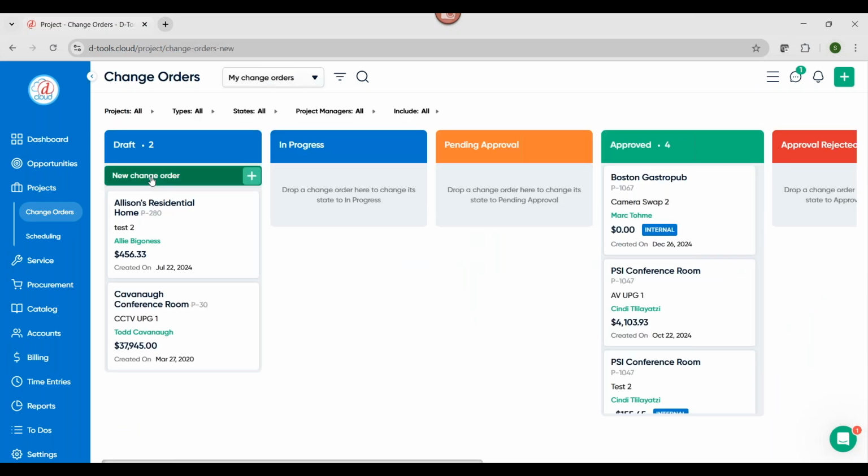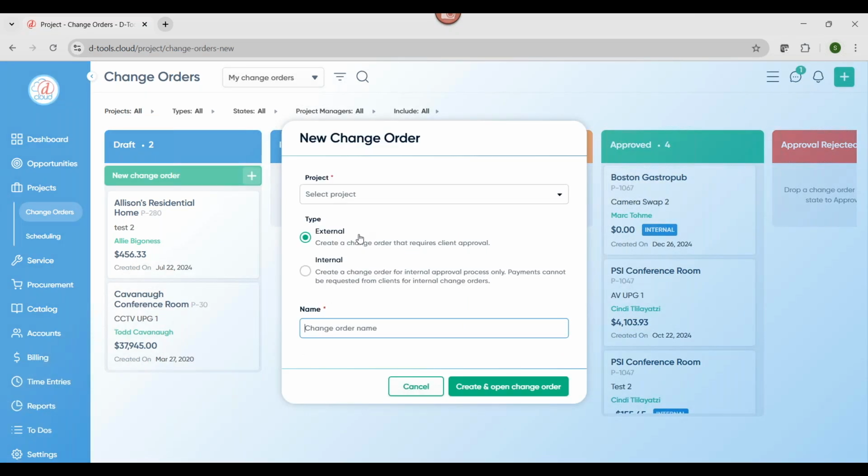Change orders are here. An external change is something that's typically client requested. Maybe they wanted to go with the 10-inch versus the 8-inch. Fine, we'll do that simple swap and we'll send them a proposal for the difference. Internal changes are non-billable. Like my example, I forgot to add a bracket. I'll just add it. It doesn't affect the dollar amount, but it does ensure that we have an accurate as-built bill of materials for this customer. So any post-sale changes, we'll go and do a change order.